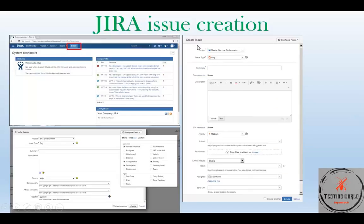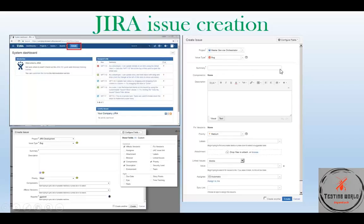How to create an issue in JIRA? On the toolbar you see the menu items and a create button. When you hit the create button you will see a pop-up window which offers you to fill in fields and create a specific type of issue. Let's say in this example we create a bug. You can hit the drop-down list to see the full list of issue types available. Here you can select the project. Summary is a mandatory field. In the description field, if it is a bug, you type the steps to reproduce, actual and expected results. Fixed version is where you add the product version where you plan to fix this issue.